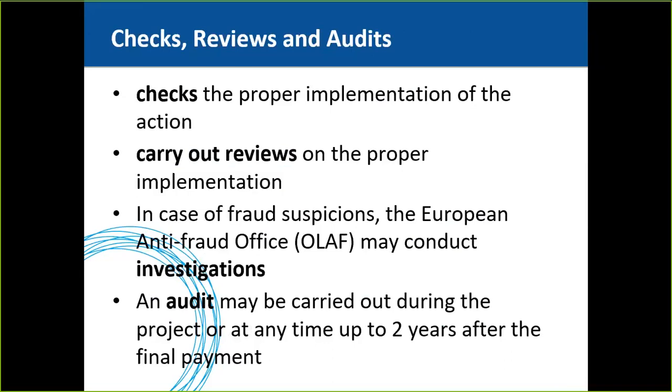So now, checks, reviews, and audits. Yes, the Commission may check the proper implementation of the action, including assessing the deliverables and the reports. For example, after receiving the reports, the Commission checks the different documents for consistency with the description and the work plan. Also, the Commission regularly performs double funding checks. The Commission may also carry out reviews on the proper implementation of the action.